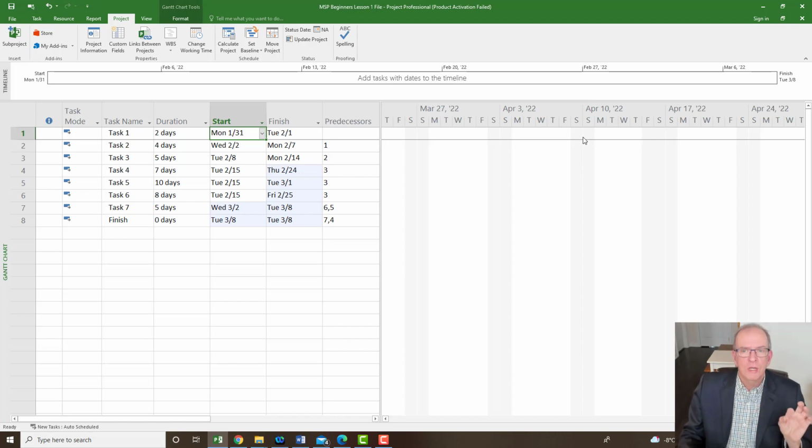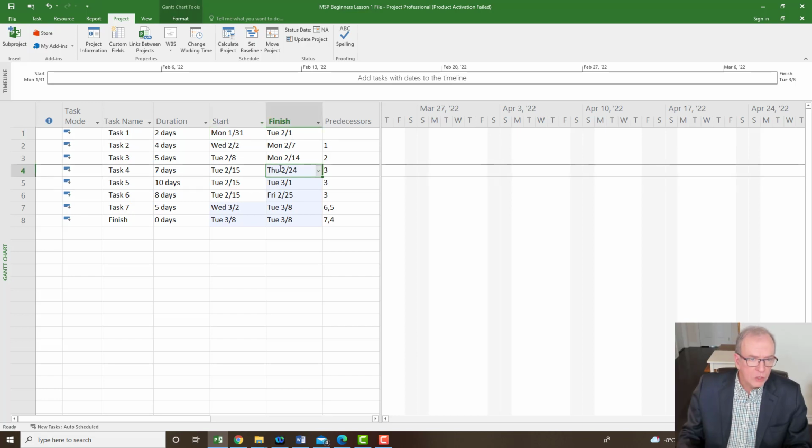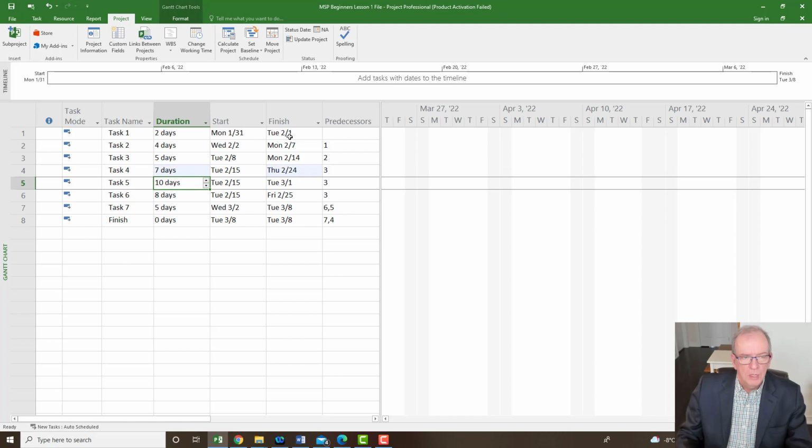I should see that hatching that I'm not actually working at that time. Now, if for some reason on your screen you don't see these hatchings when you're using Microsoft Project, it might mean that your screen is so bright, it's washing it out. But typically, you should see those hatchings in place when you're looking at it. And of course, when I did do that, it showed what was affected by me adjusting the calendar. As soon as I do another thing, this will all disappear, like this light blue coloring here. Like if I change this to 8 days, it will change, what did it affect? It only affected that. So that goes away afterwards, after you make a move.